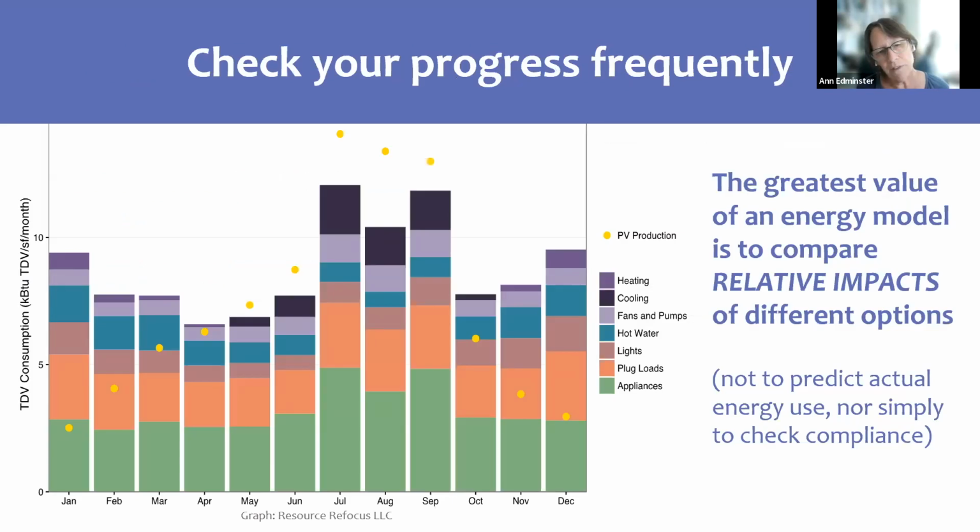So that matters. All that money can be put into performance things. So as we make our performance choices, for example, by looking at different equipment efficiencies and strategies, it's important to use our energy models to track this progress. And you need to make a lot of those trade-offs early on in order to do them cost effectively, before you get locked into choices.